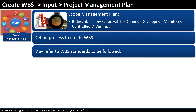For example, when multiple teams are working, everyone should follow a similar level of decomposition. As a PM, you don't want to see one team decomposing software development module 1 at two levels and another team decomposing module 2 at four different levels.